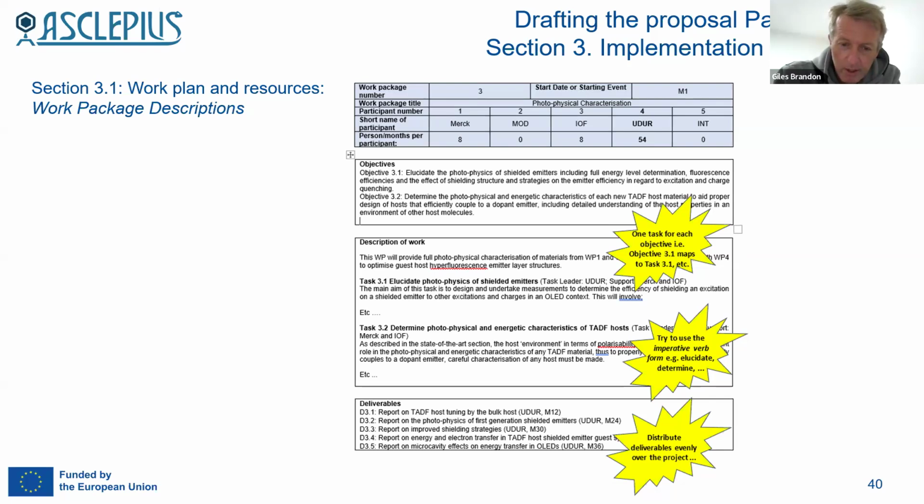Make sure that you've got, because I should add, with these projects, you'll have a review by the commission, by external experts, not only at the end of the project, but at some time at an interim in the middle of the project. Whatever the date is for that midpoint, maybe it's after month 18, if you're doing a 3-year, 36-month project, make sure that you've got some important deliverables either at month 18 or shortly before then, so that the evaluators can make a decent assessment of your progress.